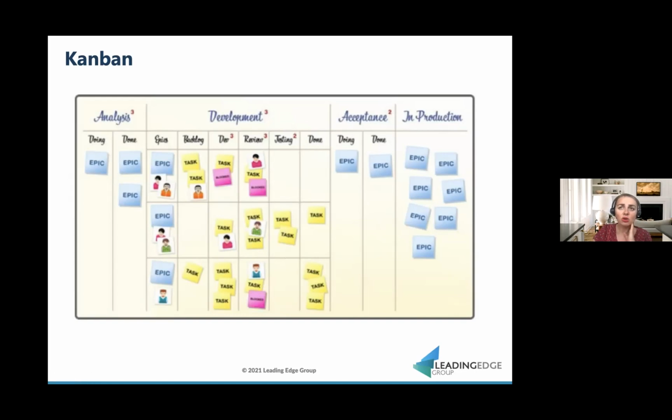So an Agile team would be cross-functional, so it means it would consist of people from different functional areas, but also people need to be multi-skilled. So everybody will have one expertise area, deep knowledge area, but also will be a generalist in other areas. And this way people can help each other. So for example, if here we see that reviews start being a bottleneck, nobody can start working on anything else until they help with reviewing. So in Agile, we would create a conscious decision about multi-skilling and upskilling the team members, so everybody can help with those activities.